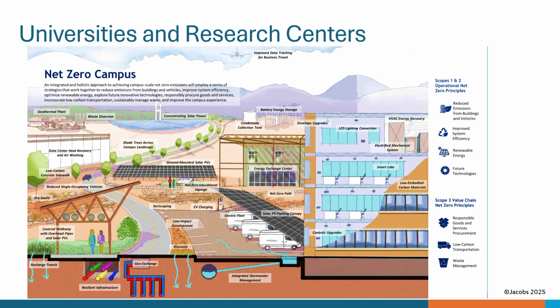The neat thing was, not only was it like a light bulb moment for the stakeholders and a way that we accomplished everybody's different priorities, but ultimately over a 30-year planning window, we were able to find that we were saving them tens, if not hundreds of millions of dollars from a life cycle cost perspective. So that's the importance of planning. I'll kick it over to Victor next to talk about detailed design.